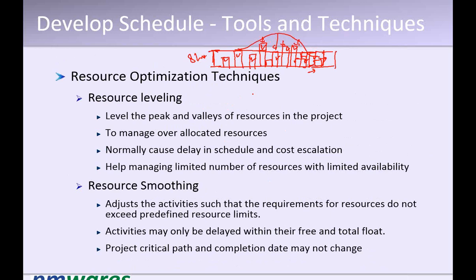But if in the critical path there is no float available, and such a scenario comes, then whether we go with leveling or smoothing, the duration will increase. So it is not always possible also.